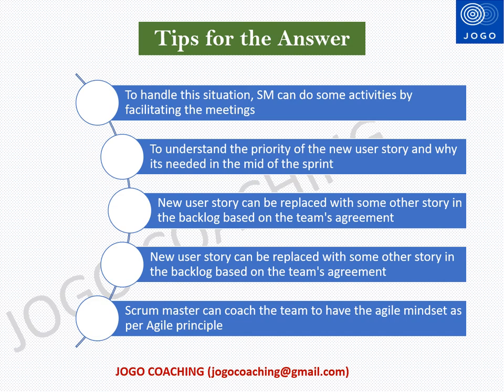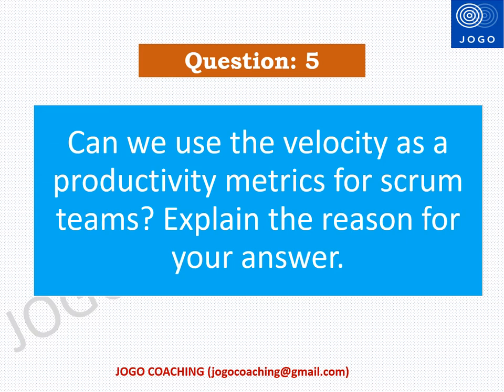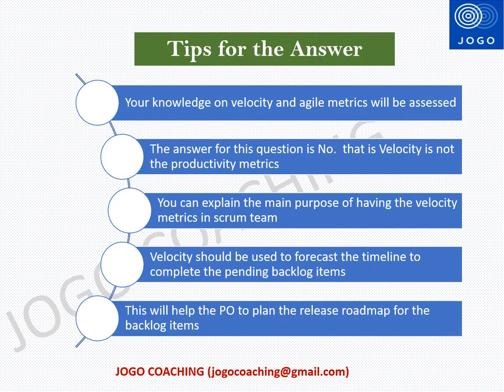You can highlight these points along with additional information based on your experience in the interview. Now let's see a few tips to answer the fifth question: can we use velocity as the productivity metrics for Scrum teams? This is another important question asked in the Scrum Master interview — your knowledge on velocity and agile metrics will be assessed. The answer is no; velocity is not a productivity metric. Velocity should be used to forecast the timeline to complete pending backlog items, and it will be used by the product owner to define the roadmap based on backlog items. So velocity is not a productivity metric for the development team.